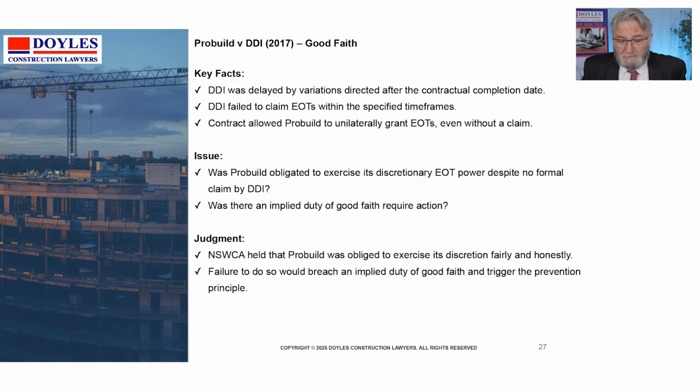So the issue here in this next case, all disputes over things that have not met the expectations of the parties. The DDI as a subcontractor to ProBuild was delayed by variations directed after the contractual period. It failed to claim EOTs within the specified timeframes. The contract allowed ProBuild to unilaterally grant EOTs even when they haven't been claimed. So the situation is DDI should have claimed it. They should have put in claims all the time. However, there was ability in ProBuild to unilaterally grant extensions at times, even not claimed.